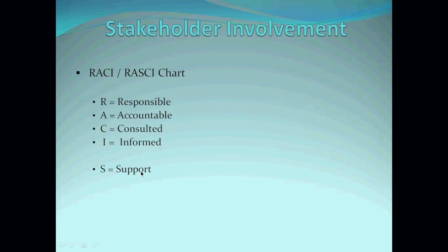And also, if you have any support from other people, maybe the person that will be supporting that business requirement document, then you put them against the S. So each of these will be against each task. You could have different lines, like producing business requirement documents, maybe facilitating a workshop. When you are talking about business analysis tasks, if you are using the example of facilitating a workshop, you say the business analyst is responsible for it. The project manager may be consulted.